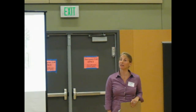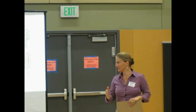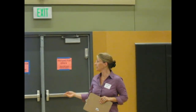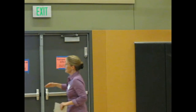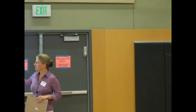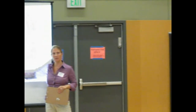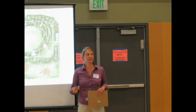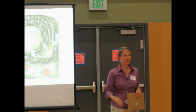And then, of course, we're moving forward with the design of the play area. We're kind of getting up to that at the same level as everything else so that we can move the project forward as a whole. So there was a time when this was funded separately and the funding was becoming available later, but we're moving the funding forward so we can get this entire site as one project, which will be beneficial in many ways.